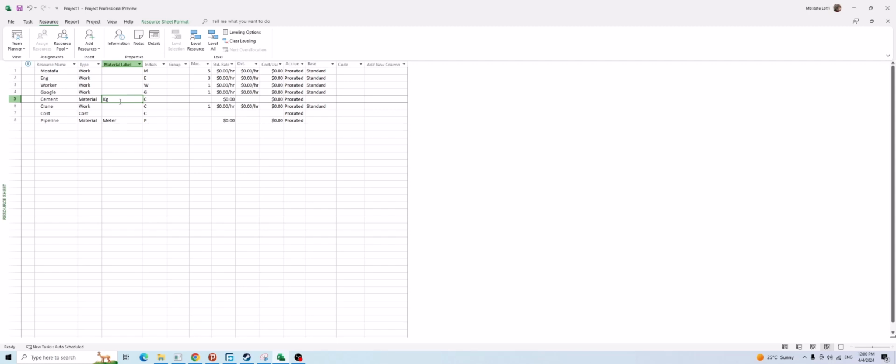You're supposed to build something with 10 kilograms of cement, but now you have 9 kilograms. So you cannot finish your project. Basically the scope is changed. But work is a little bit different. You can finish a task with 5 people, right? You can finish a task with 5 people.